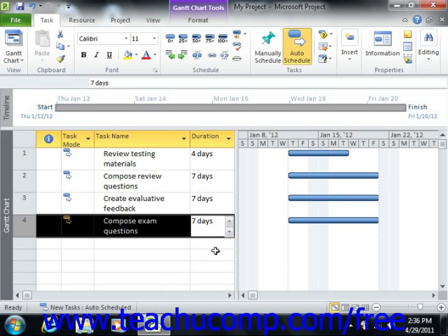Most often, tasks are linked to each other, and one task can begin whenever the other finishes. Setting a task duration and then linking tasks to each other in order of the necessity of their completion versus specifying a definitive start date allows Microsoft Project to change the start and end times of tasks within a project file to reflect the scheduled reality of the workload.